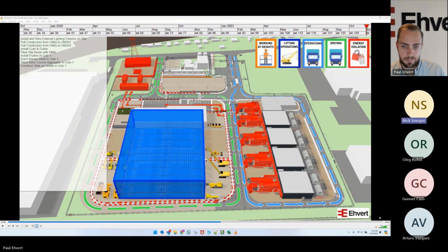Yeah. The first one I got is we gave you a schedule that's not fully finalized. Is it broken down enough for you to set up these sequences? Like, is there enough detail in there? There is. We will definitely have to add additional elements in there. And I was going to get to that next, in particular with the sequencing of the OptiStacks. There's enough to get started. We'll probably have to add some additional detail because I know you're going to want to see the sequencing and more granularity than what we have in just the activity list. But I think we have enough to get started.